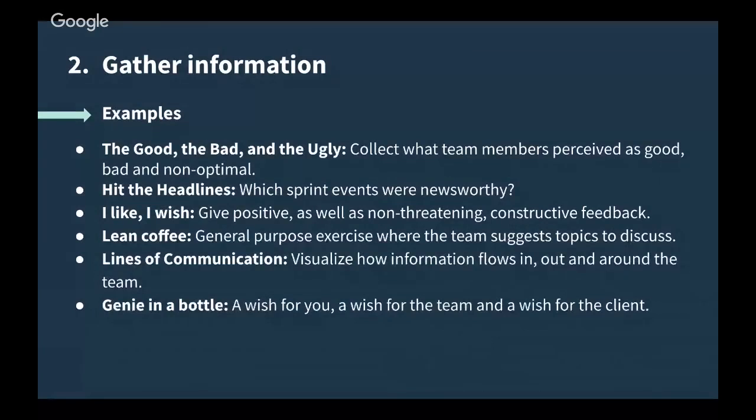Another one is I like, I wish. Also 2 columns. You put post-its there, and you give positive and constructive feedback of things that you would like to happen. And it's the same here. You say what's good and what you could improve for the next sprint.